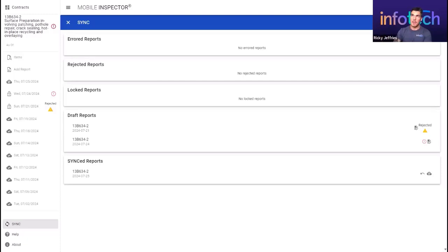So if there's one material set on the record that you've selected, or no material sets selected, but there's one on the item posting, the bridge is going to auto select that material set for you. Those reports are going to come in as pending approval. The only time a report's going to come in as draft is if there's more than one material set on an item and you haven't selected any of them. That report's going to come in as draft. That is just standard AASHTOWare Project functionality.